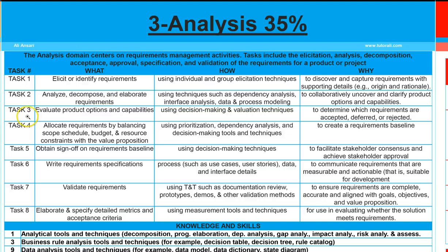The third task we have here is evaluate product options and capabilities. And how we are doing that is using decision-making techniques and valuation techniques. Why? To determine which requirements are accepted, which are deferred, or which are rejected.